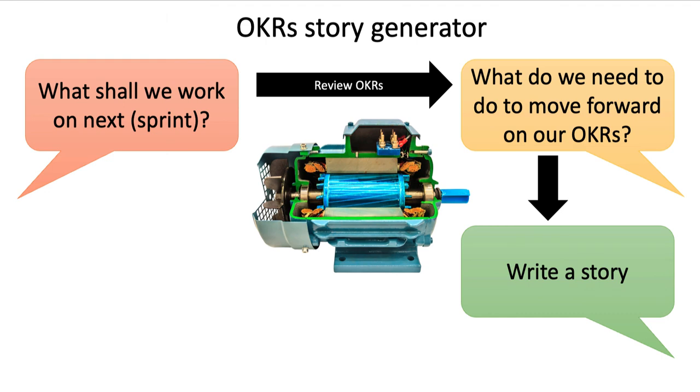If you can quickly find a story in the backlog that describes the work that you need to do to move forward on the OKRs, then by all means take it from your backlog and get on and do it. But if the story doesn't exist, or the story takes a few minutes to find, you might as well write another story. So what if it's duplicate from the backlog? That's not important. It's about moving forward on your OKRs. You can always delete a duplicate later on.